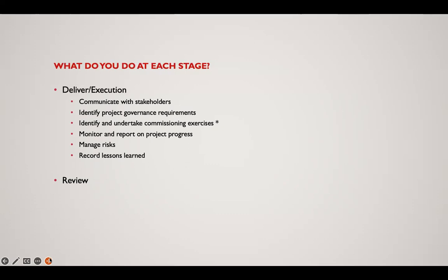If they said they've done something, they've spent so many hours, so you spent 5 hours, did you earn that 5 hours? That is your job as a planner. You start asking those questions based on the data given to you. And what you will do after getting the progress, you start communicating that to the SMT or to whoever you are reporting to. You might be reporting to a program director.